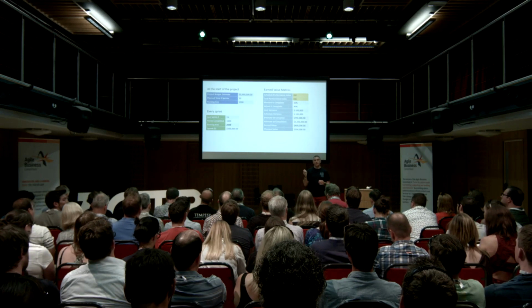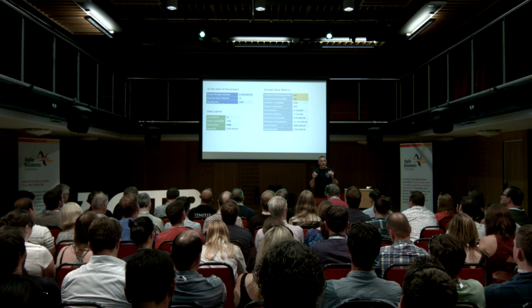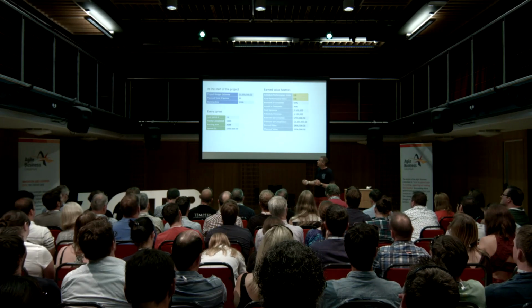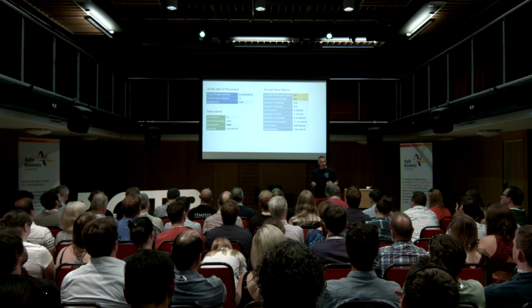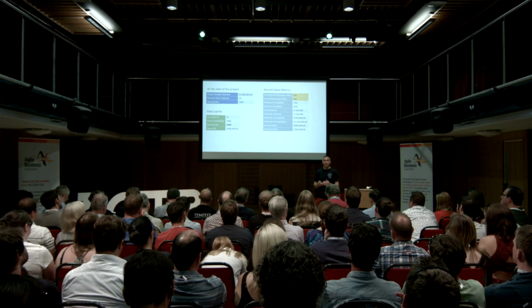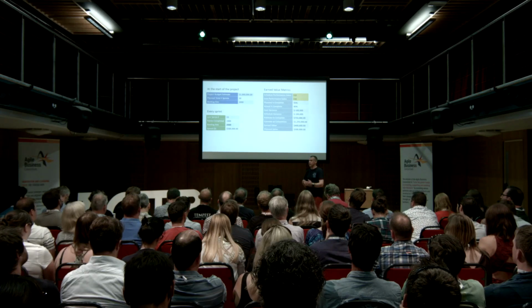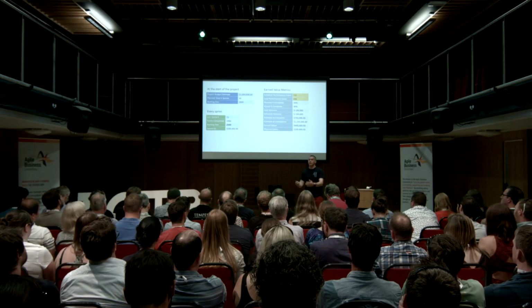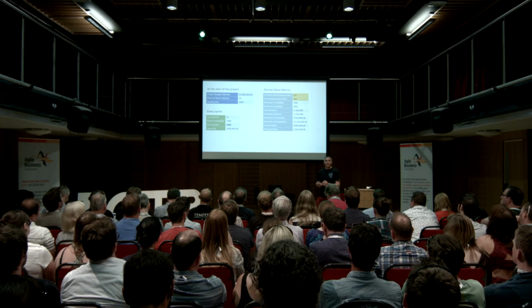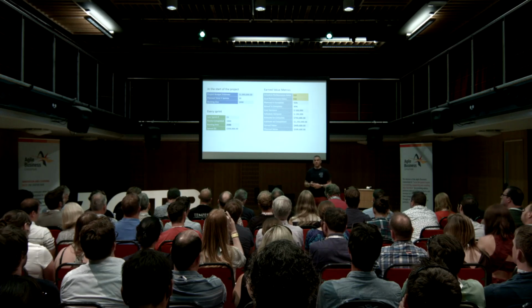So this is now showing you that in order to finish everything that's in the backlog, we're now too far behind where we want to be. So we might have been totally on track for what we thought we were, but the actual total work has changed, so we now need to be further ahead. So this is giving us an indicator that there's something that we might want to investigate with the team.